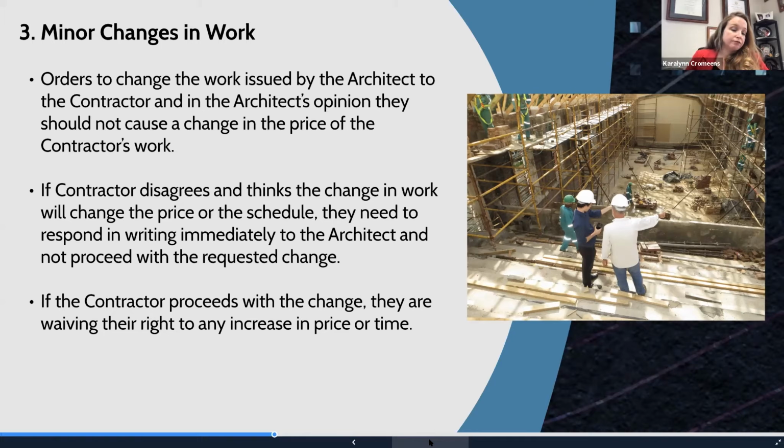So if you get a minor change in work issued, look at it, see what it really is, and make sure that before you move forward with the work, it's not going to cost an increase in time or money. And that's also under Article 7.4 in the actual document.